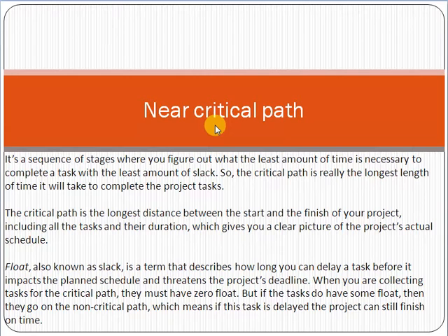Now currently we are talking about the critical path method. So if you are assigned an e-commerce project, first of all you have to make a WBS, a work breakdown structure. You will break the project into smaller pieces of tasks so that you can estimate the tasks in terms of time and cost. Then you will sequence the activities, so that you know the sequence in which we proceed, and how they will end.